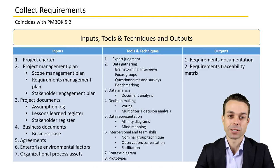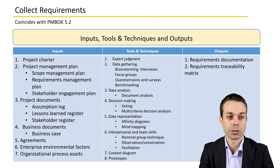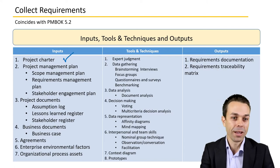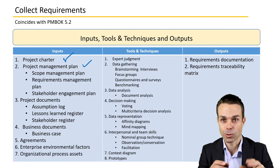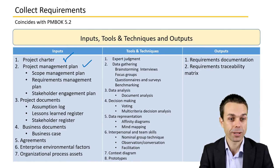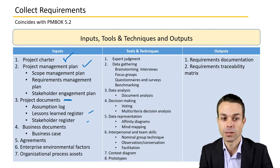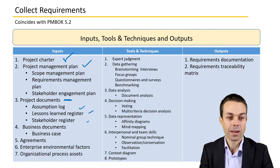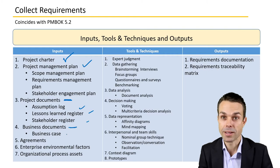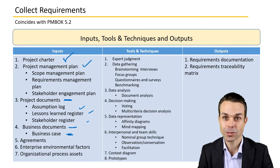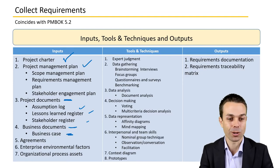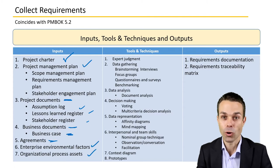The inputs, tools and techniques, and outputs for collecting requirements: inputs include the project charter — our initial high-level view — the project management plan, project documents we need to update, lessons learned, stakeholders, assumptions, and business documents. The initial business case has all of those initial requirements as well. Any agreements that have been made, and enterprise environmental factors and organizational process assets.